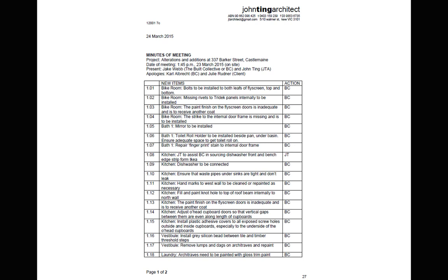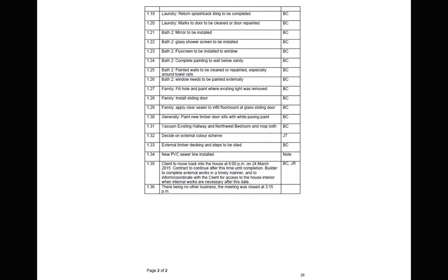that there were a few small things that needed to be done, all of which were listed down here. But none of this was enough for me to not certify the claim that he had put in, the invoice that he had put in. So this list here is just stuff that still needs to be done, but all the other stuff had already been done. All this stuff was about things that need to be done before the next stage. And of course, if anything from the previous stages that he was billing for had not been done, I would wait for that to be done before I would certify the claim.